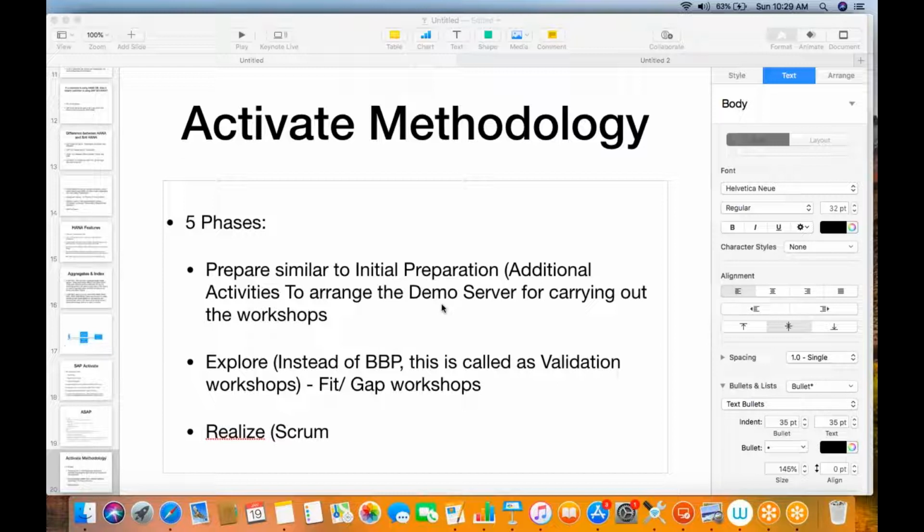You normally visit regularly, right? On a day-to-day basis to check what is happening. If there is anything wrong, you can tell here itself that no, what you are developing is wrong. I don't want it like this. Maybe in the photo it was looking good, but now I want to change my requirement. I want to do this. So at least you can save the time. You can save the time of the carpenter also. Ultimately, the carpenter's time is your time, because after 3 months, if you come and tell, no, I don't want this, again there is rework and again it will take more time, right?